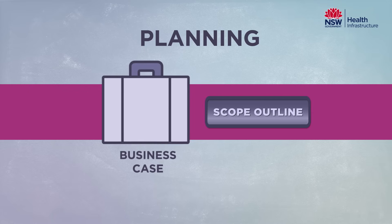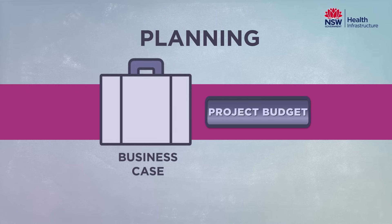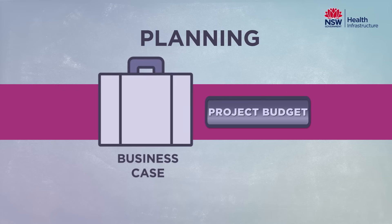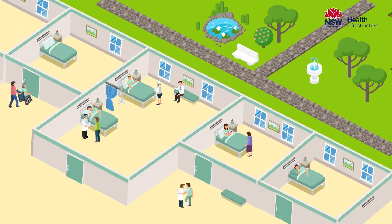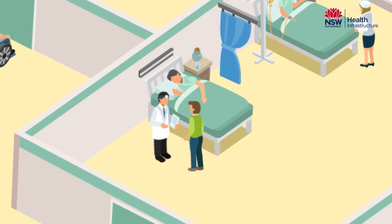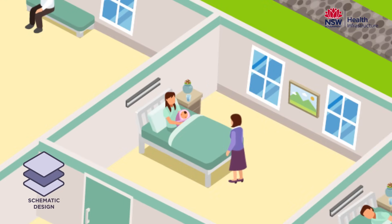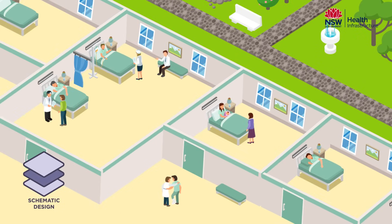The business case outlines our scope for the project and determines our budget for the redevelopment. Following the completion of the business case, we engage further with project user groups to inform the schematic design planning phase. Schematic design provides the next level of detail, such as how rooms and services relate to each other and how patients and staff flow through the facility.